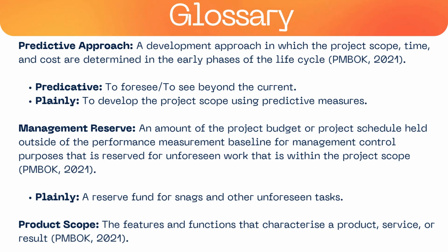Your management reserve, we have also gone through this briefly previously. That is an amount of the project budget or project schedule held outside of the performance measurement baseline for management control purposes, that is reserved for unforeseen work that is within the project scope. So plainly, it is a reserve fund for snags and other unforeseen tasks. So we've mentioned that you've got your project budget, and then you also have your management reserve.